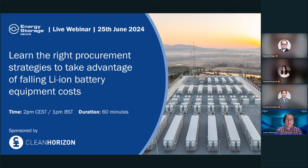The market dynamics can be complicated. For example, while the modules are now the cheapest among the main components in a solar PV system, balance of plant equipment, construction, permitting, and other soft costs can dramatically impact the overall cost of solar projects. Conversely, even with the costs in rapid decline, battery cells still represent the single most capital-intensive investment in a battery storage project from the technology side, and batteries are also far less commoditized than solar modules.